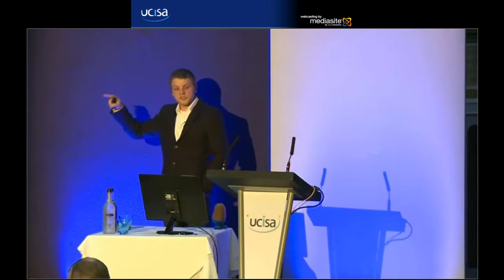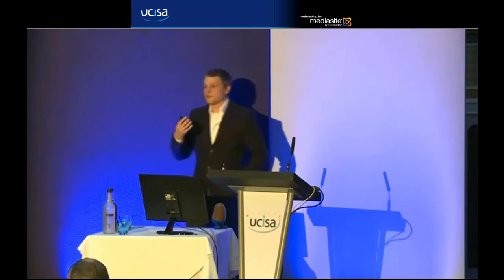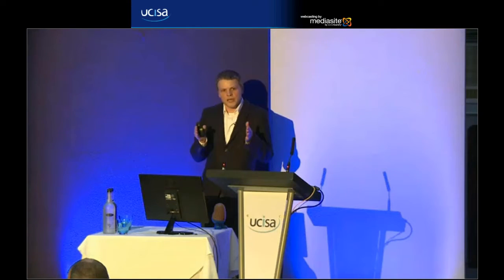Often you'll find that the team velocity will change as the project goes on. When the project starts, you might not be able to do quite as much. People are still getting to know each other. They're getting to know the requirements of the project. As the project progresses, the team velocity can increase, so you can start to take more points from the product backlog.